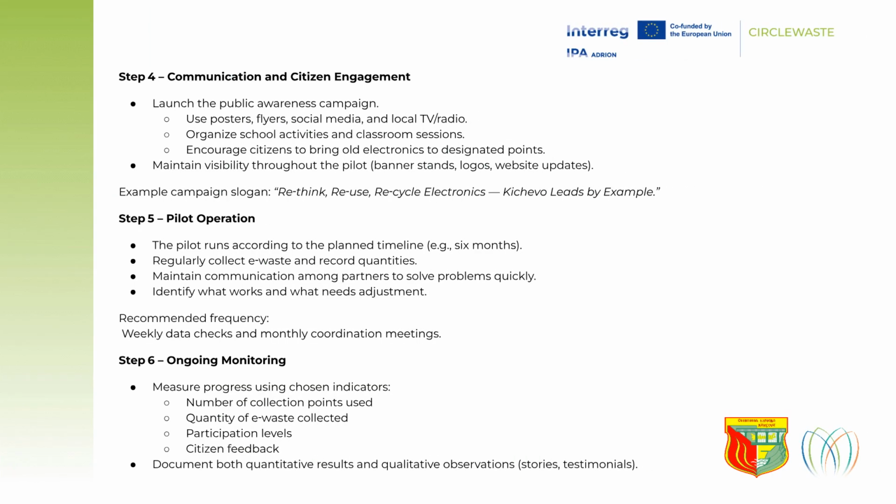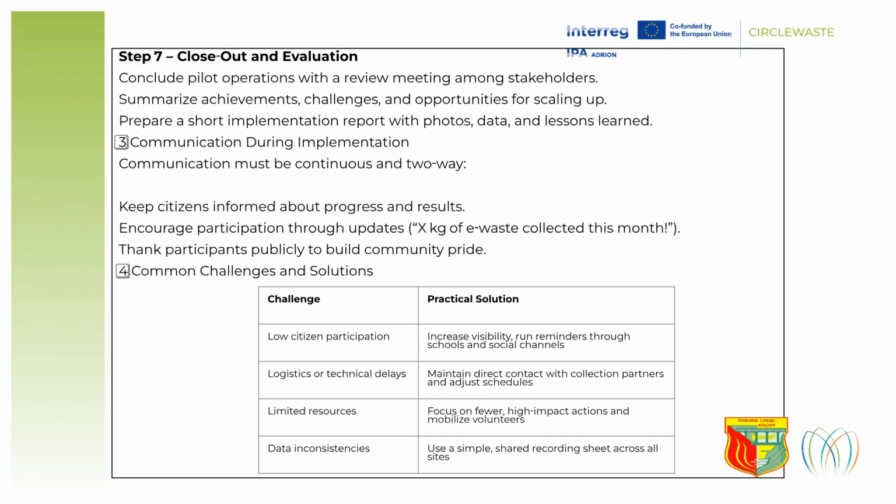Step 4 focuses on communication and citizen engagement. Launch a public awareness campaign using posters, flyers, social media, and local media. Organize school activities and encourage citizens to bring old electronics to designated points, maintaining visibility throughout the pilot. Step 5 is the pilot operation.